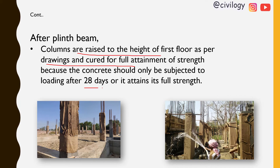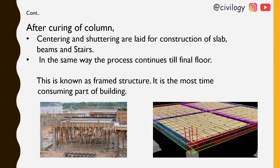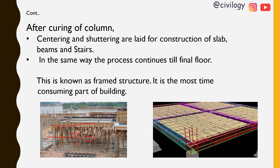Full curing requires at least 28 days, but on site it is typically done for 10 to 15 days. After curing of columns, centering and shuttering (shetting) are laid. The horizontal support is known as shetting and the vertical support is known as centering, as you can see in the picture.